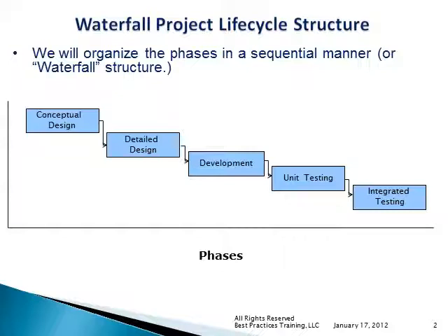So we broke up the project into these sequential phases, and they flow in this nice waterfall fashion. The main idea is we have to completely finish and wrap up a preceding phase before we start the next phase. So the conceptual phase is all about defining our high-level requirements for the project: get user requirements, get high-level functional specifications, get that documented, get that all nice and tidy and neat, wrap it up into a functional spec. It might take us more than a month, a couple of months or longer to acquire those high-level functional specs and user requirements.